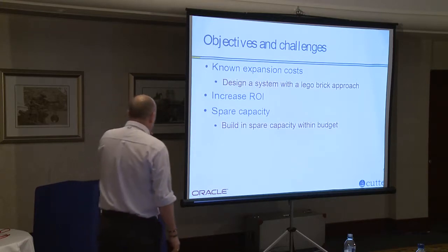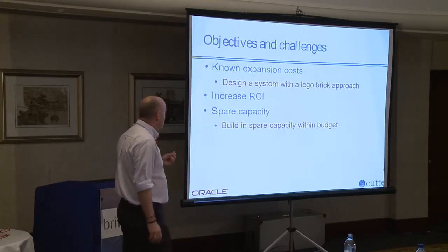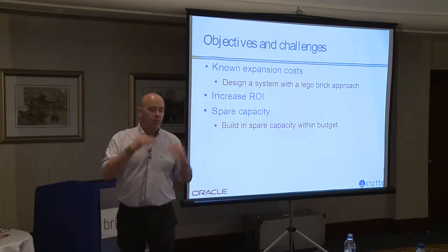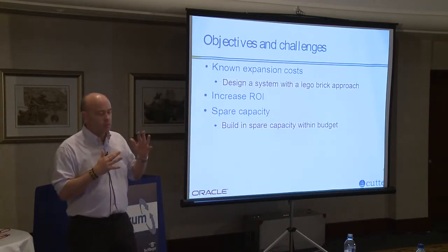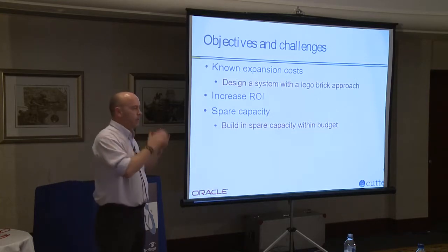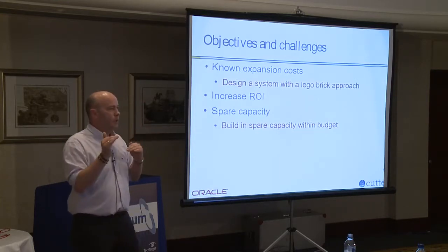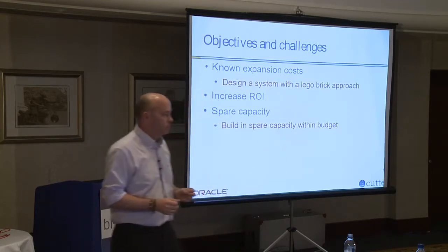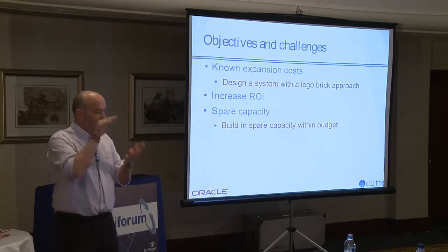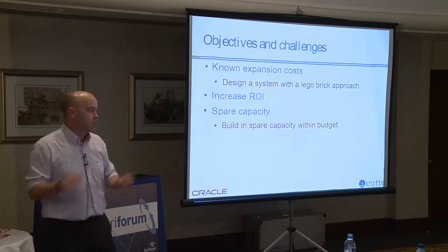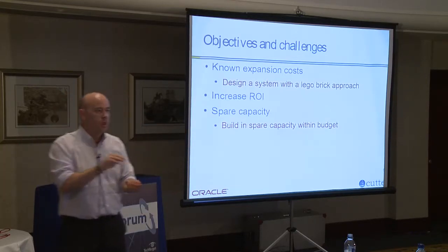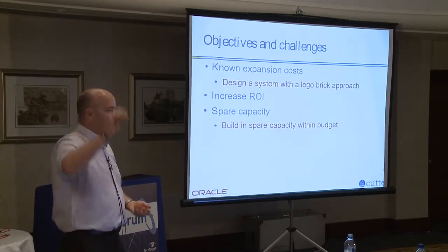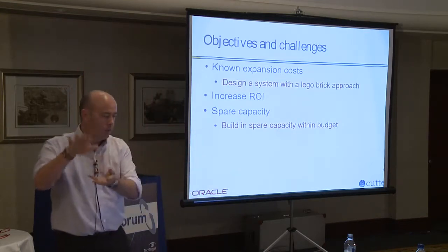They wanted to know the expansion costs, so we needed to design a system with a kind of Lego brick approach, and that dictated what the final solution looked like. There could have been some significant tweaks in the back end side of things should they have wanted to go down a different direction, but they wanted to go, right, I need to deploy another 100 desktops, how much is it going to cost me? And they wanted that consistent throughout the process, not at the point where you got to 500 desktops and then suddenly had to deploy another 50,000 quid's worth of storage. They wanted 100, 100, 100, 100.